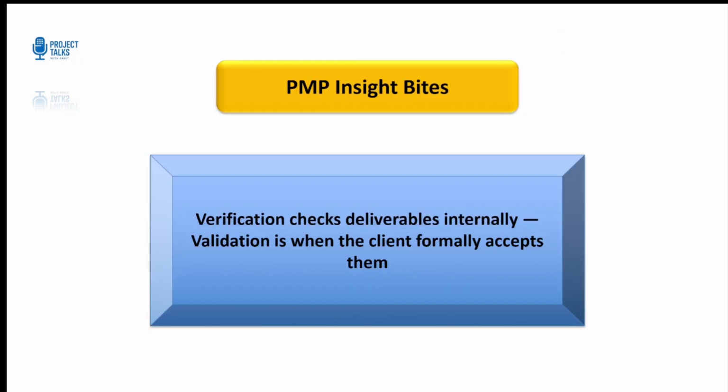That brings us to the PMP Insight Bite. Now understand, the verification checks deliverables internally. The validation is when the client formally accepts them. So this is the difference, right? We verified internally to ensure that once it is validated from the client, it is formally accepted.